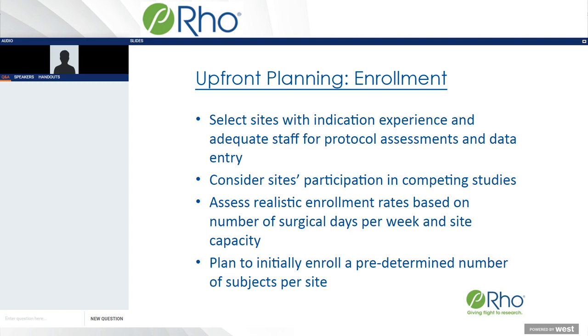I know that is a pretty obvious one, but also the resourcing. So we talked about this a little bit. Make sure they have the adequate staff, not only for conducting the protocol assessments, if they're going to be keeping subjects over the weekend, do they have staff? Do they have night staff if that's needed? Do they have data entry staff? And then most important, do they have quality management staff that will oversee their operations as well?